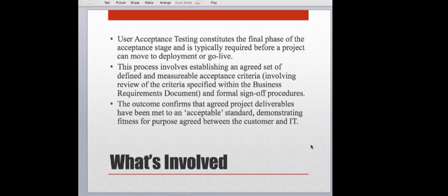But what you're really trying to avoid is having any major defects by the time you get to user acceptance testing. So you want to find and fix the more critical and major defects prior to user acceptance testing, so that whatever comes out during UAT is really more minor issues. That really is what the goal should be for user acceptance testing.